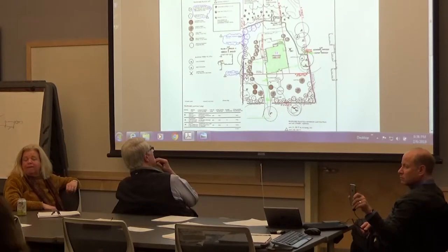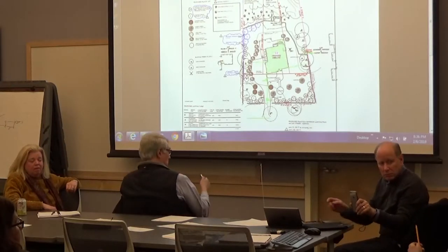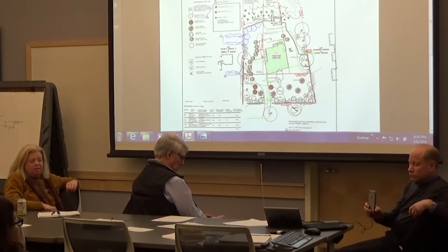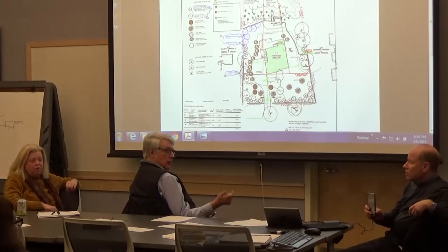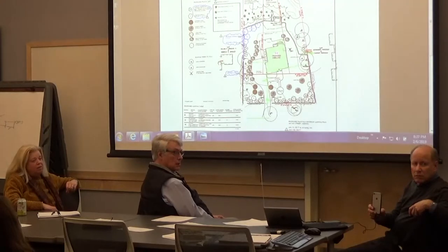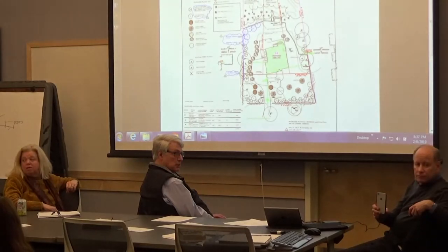Actually, the building inspector has the authority to issue a COA. If he does an inspection on the house and views it as not a safety concern, but a permanent CO is what you need to issue. When you say COA, I think you mean occupancy. So they're fine with the house for 180 days that John signed for. When did that start, November? September, month seven. There's a sunset date on the temporary.